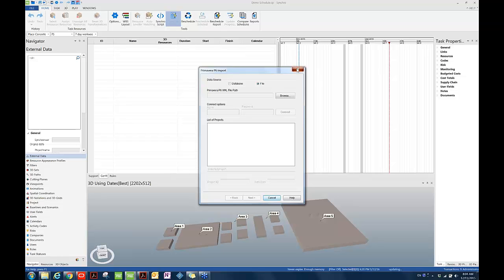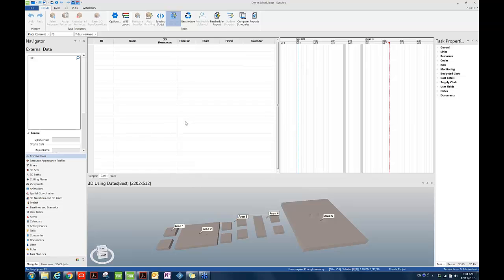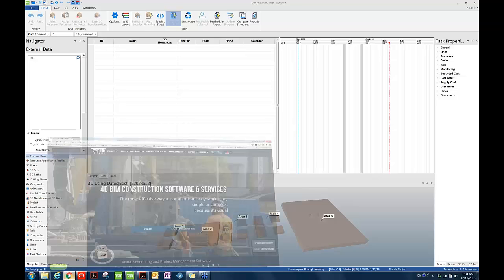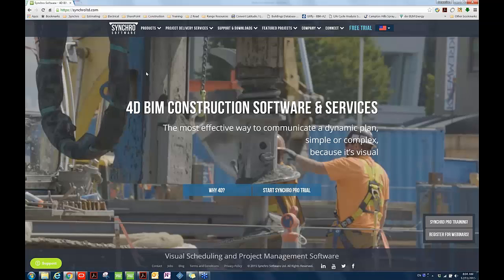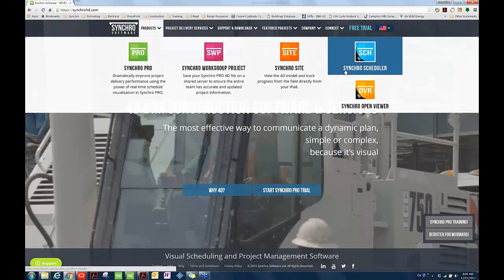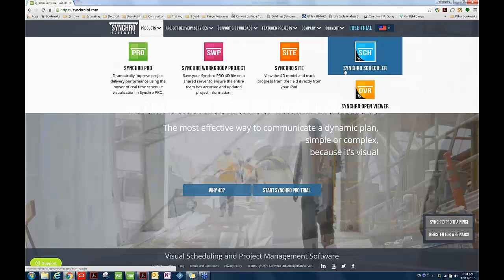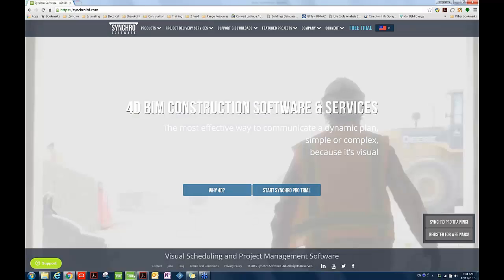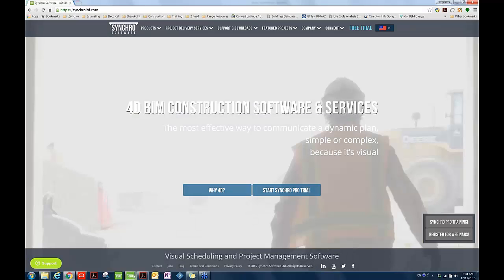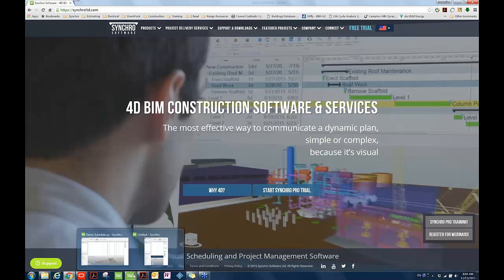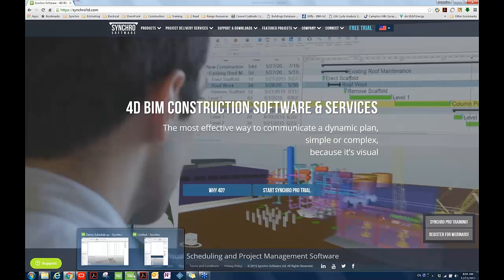The user must have proper permissions to import P6 data. If the schedule is updated in P6, simply use the external data synchronized from command to connect to the P6 database and bring those changes into Synchro. You can always draft your schedule in Synchro Pro or Synchro scheduler. Synchro scheduler is currently available for free. You can download it from our website. It's a scheduling tool that has full scheduling capabilities and can be used in lieu of other scheduling software.